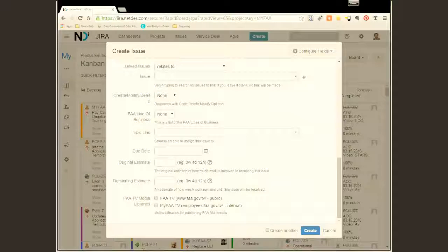Inside of each of those buckets, you have the little cigarette box sized boxes. Each of those is the task. So create the database, build the data structure for users. Each of those would be a task. Each of those tasks combined creates a story, that's the middle bucket, and then each of the stories creates an epic, that's the biggest bucket. So that's your epic. Your epic is a container, a large container of all kinds of smaller items. Due date is very simple.